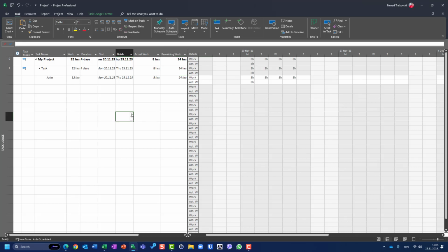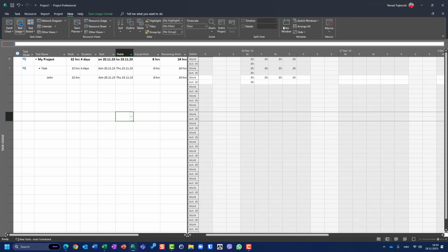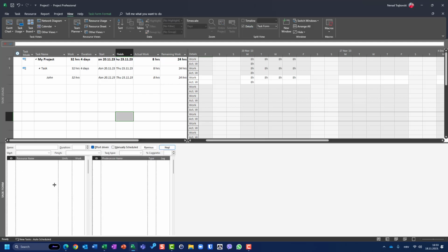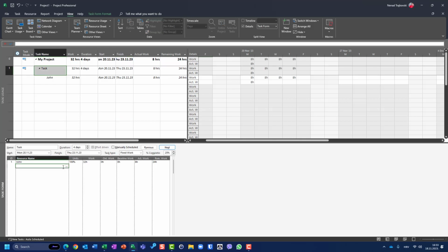And that's good. Now, let me assign Mary to that same task in this situation. What will I have? Okay, let's go to view here, and let's go to details. I will get the task form and let me choose work. Okay, I'm going to assign Mary here. What will I have if I click on OK? So you will see that Mary is going to work 12 hours and John 12 hours as well.